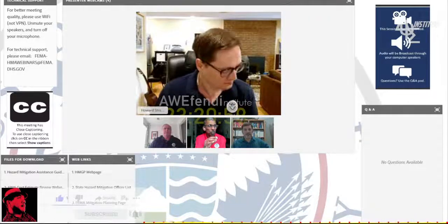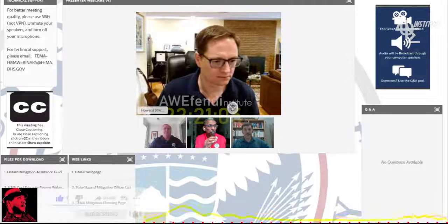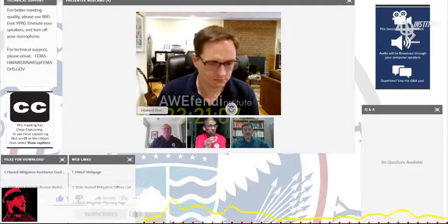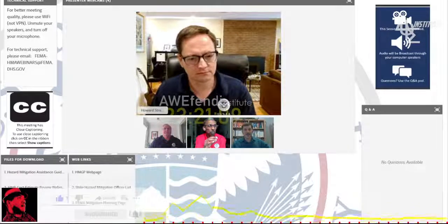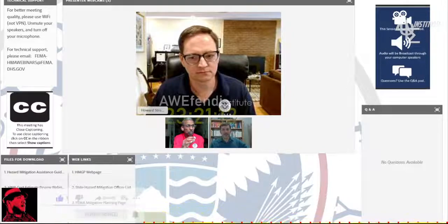Well, if an estimate is solely based on lump sum cost, I did mention this, that's not acceptable per FEMA standard. However, some line items could be lump sum, and those have to be justified. The main justification is if they are very common and known as industry standard.